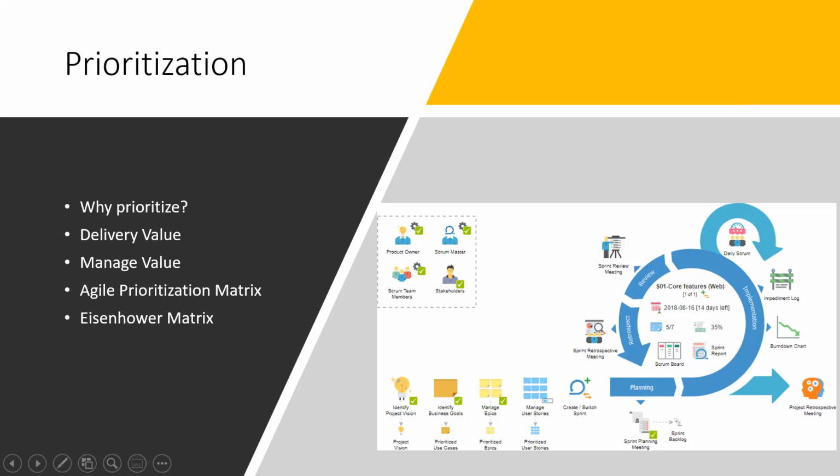Now, in this case, how do you prioritize your use cases? What is a must for my website? Having the theaters is a must. Having the movies against those theaters is a must. Without those things, I can't start. Right? That is how you prioritize. What is a must have, and then payment. Yes, that's a should have feature.